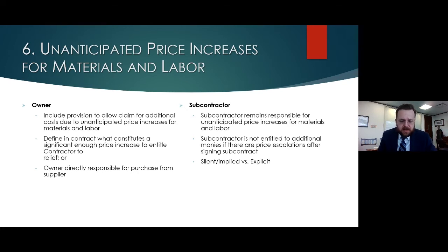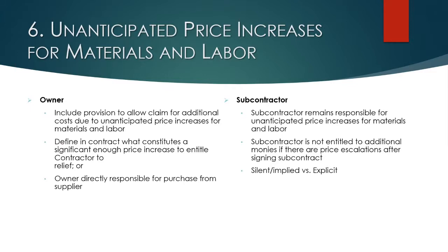With your subs, if it's a fixed price subcontract, the sub is generally going to be on the hook for price increases. In your normal fixed price contract, you may not deal directly or explicitly with price increases, and it's just implied because it's a fixed price.